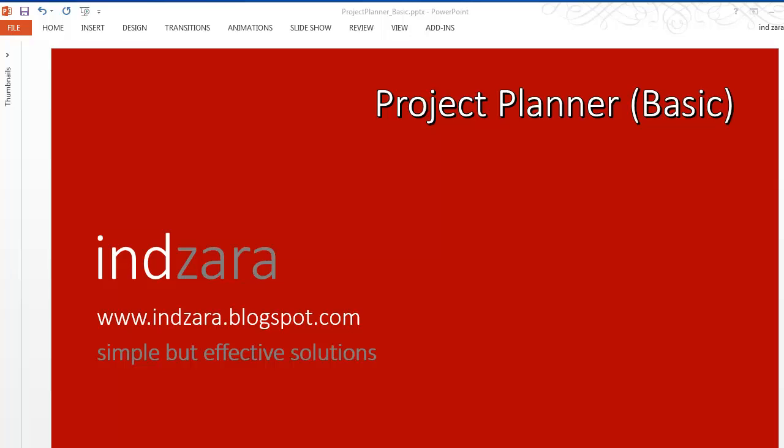This template can also manage multiple projects, not just one. And when you have multiple projects, you would assign a priority to each of the projects. So the higher priority projects should be completed first. So the template will automatically take that into account and prepare a plan for you in which the higher priority projects will be attempted to complete first.